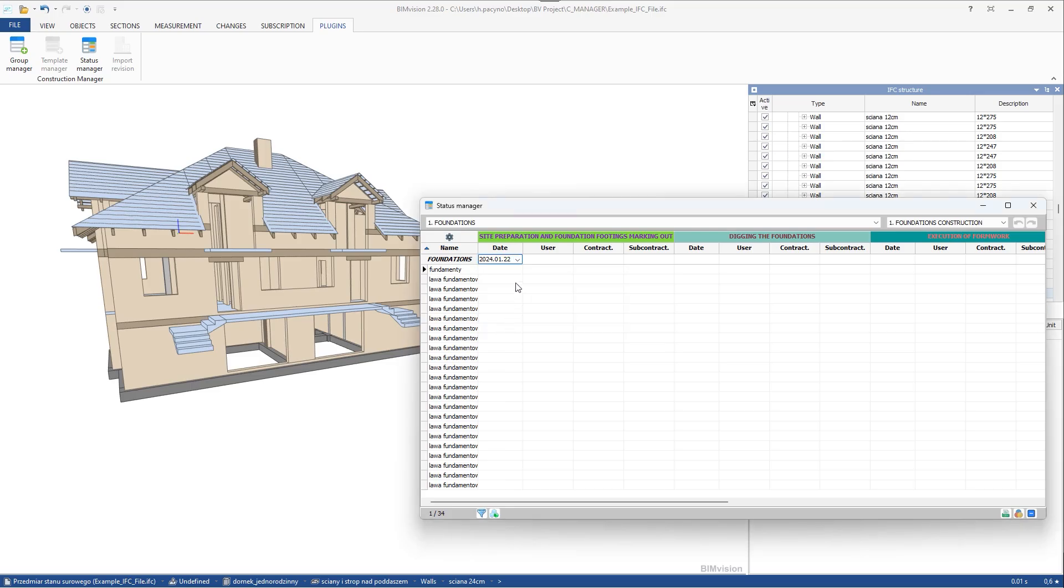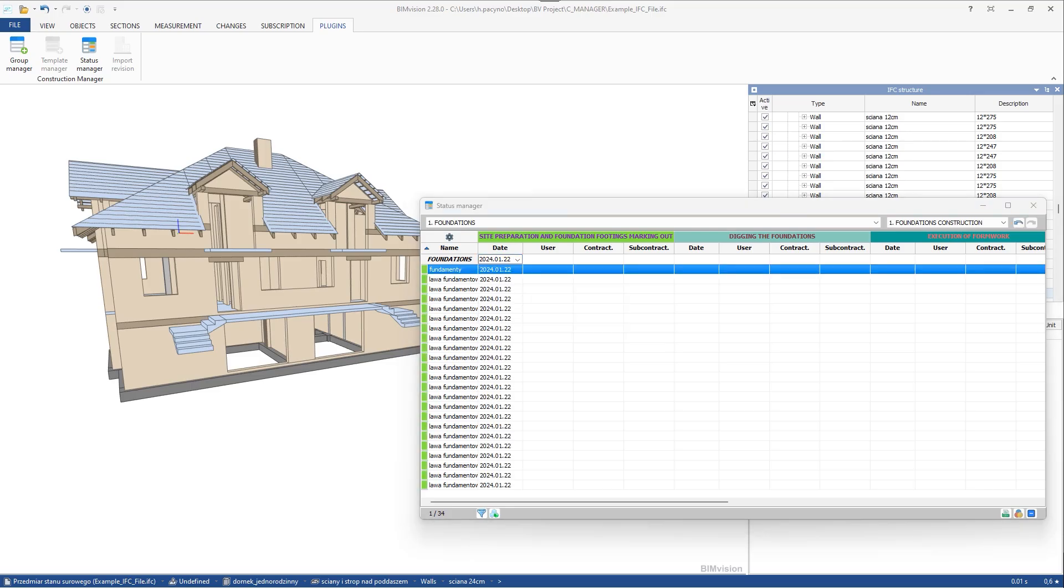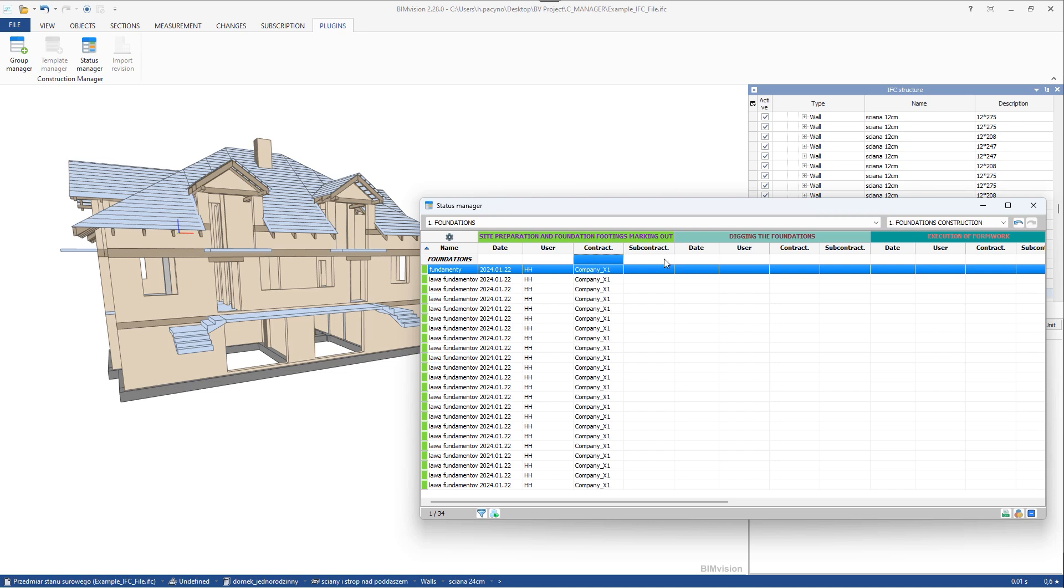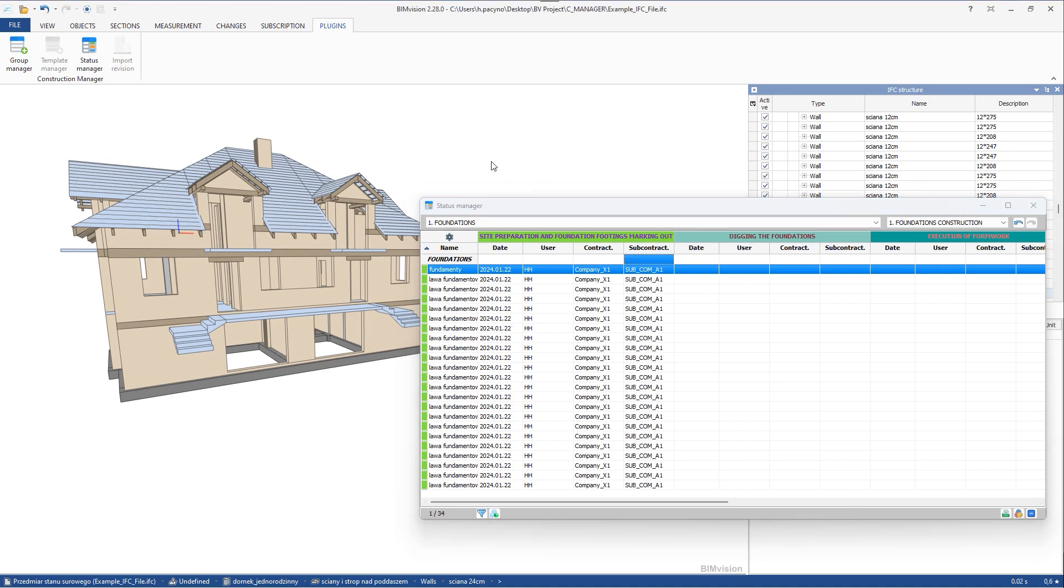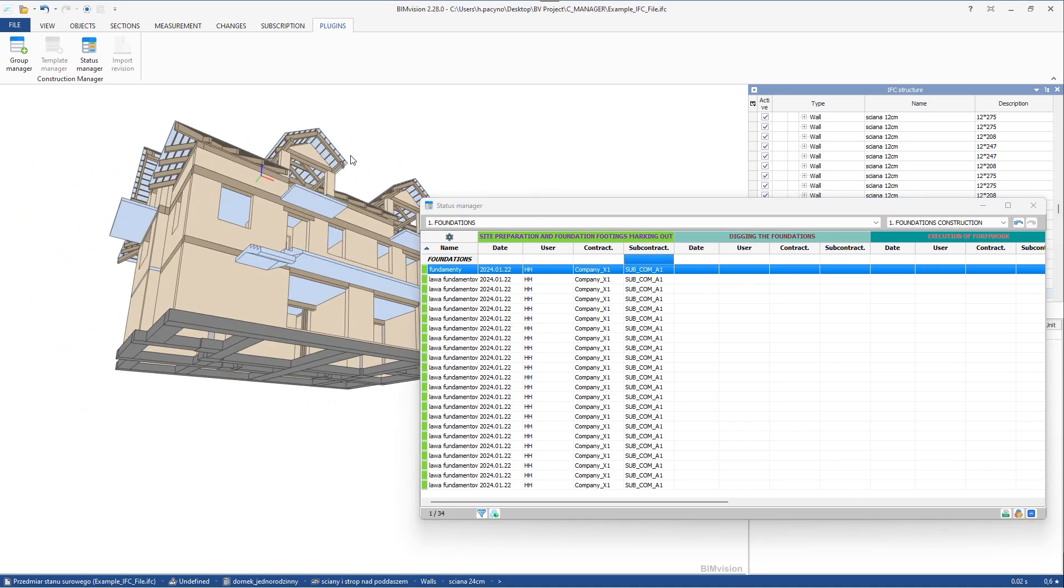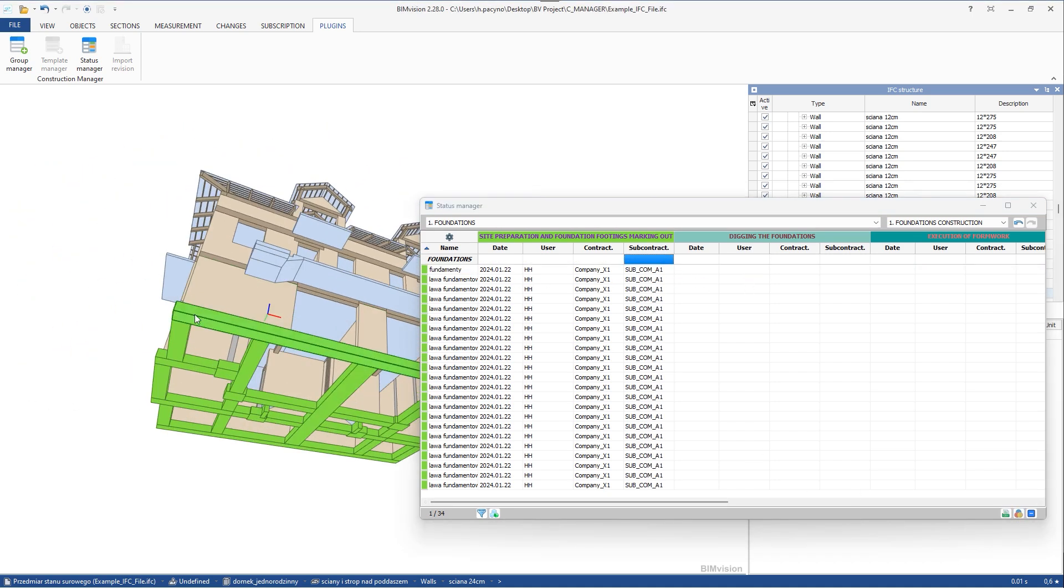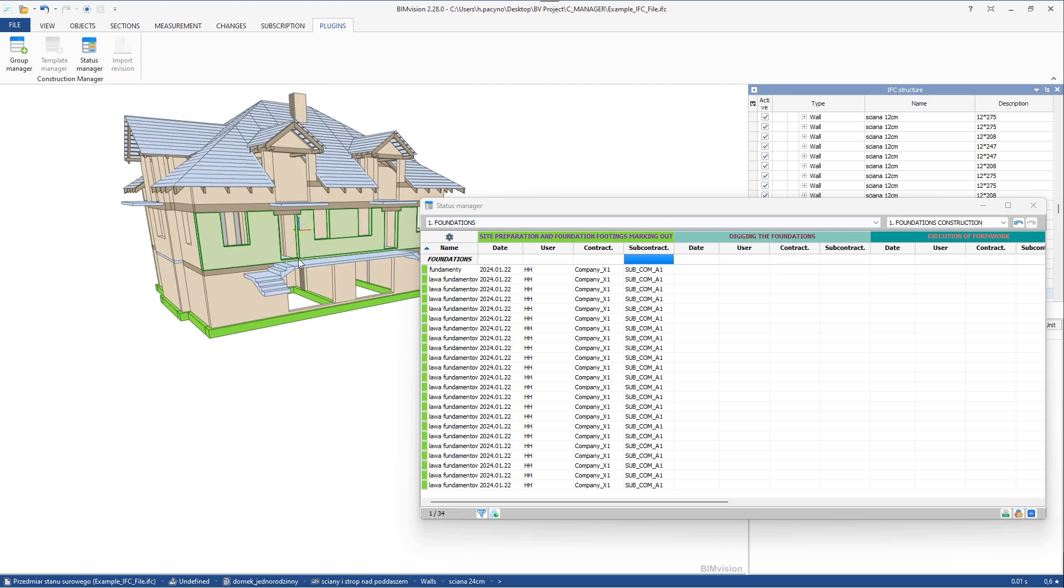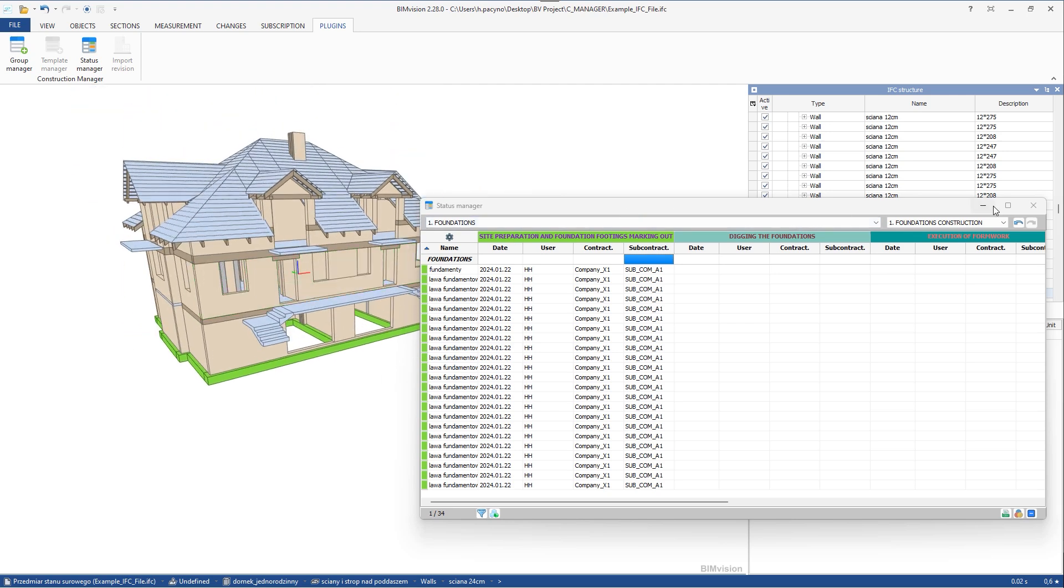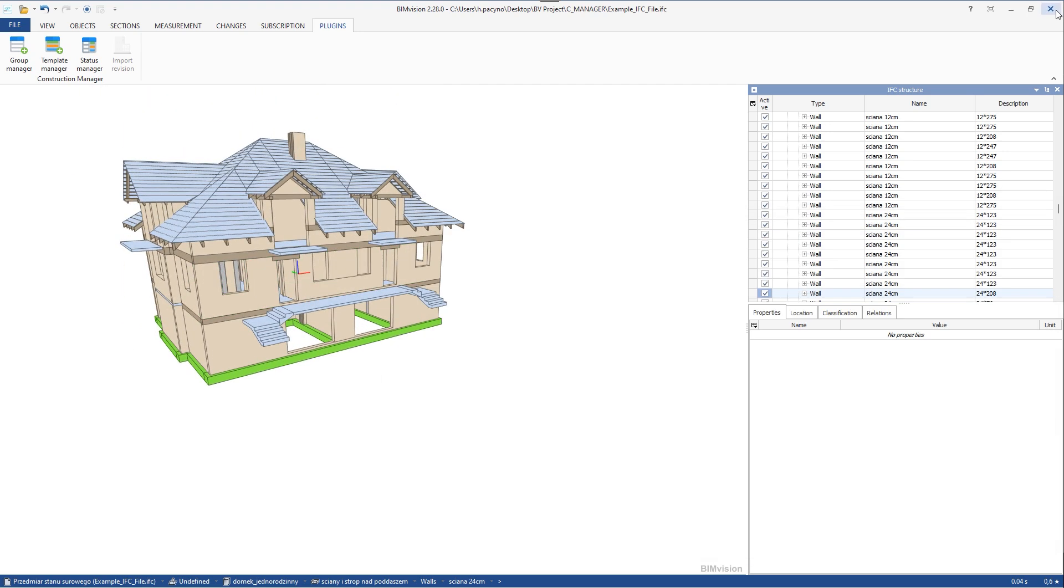Once the data is provided, the connection between the group and the process is fixed. We can complete information when and by whom the task was done or who provided the data. Each task has its own color, set in template manager. When elements get a due date, a color is assigned to them. We can visualize the model with the current status color by clicking the dedicated icon.